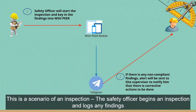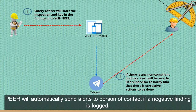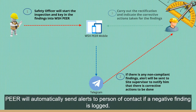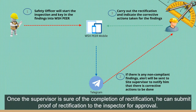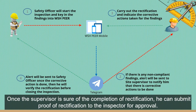Here is a scenario of an inspection. The safety officer begins an inspection and logs any findings. Peer will automatically send alerts to the person of contact if a negative finding is logged. Once the supervisor is sure of the completion of rectification, he can submit proof of rectification to the inspector for approval.